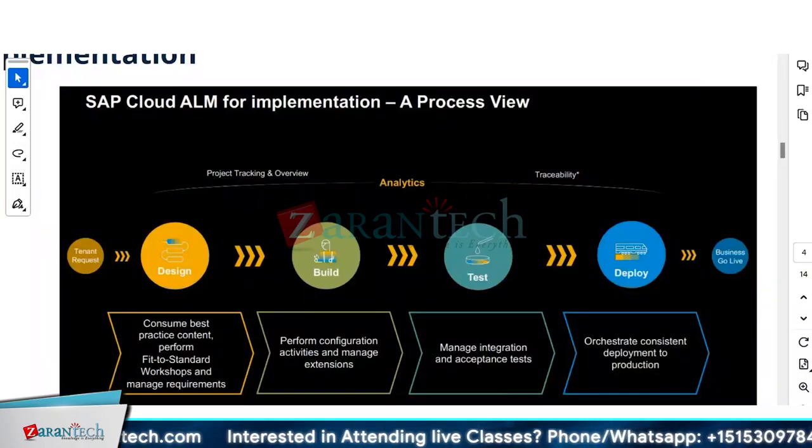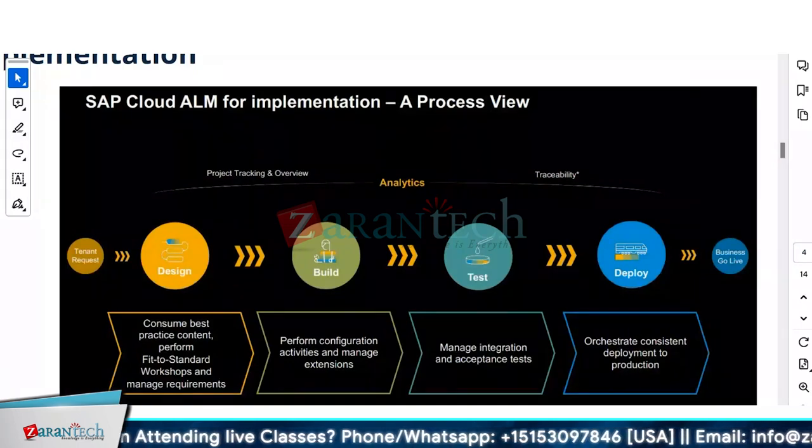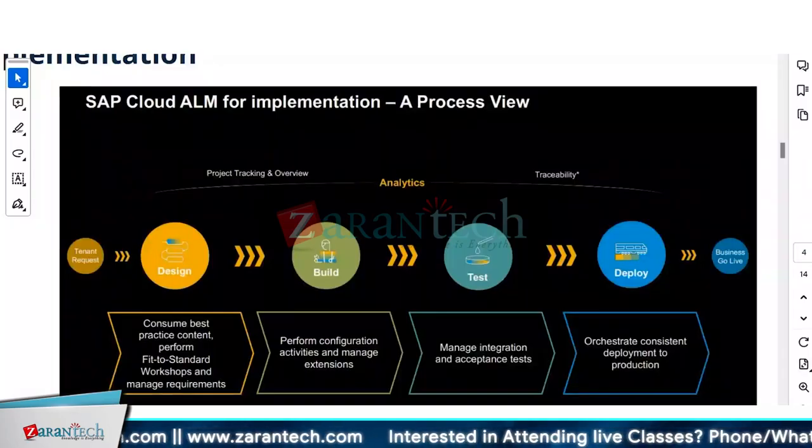So as SI partners, as integration partners, we have to take that into consideration and let the customer know that this piece is not with us. Like the integration, I'm responsible for getting it done, but I actually can't do it because the configuration access for that piece is with SAP. I'm not able to action on that, right? So there will be a lead time of 7 days, 7 days, 14 days, depending on how it is. That time frame you should take into consideration.